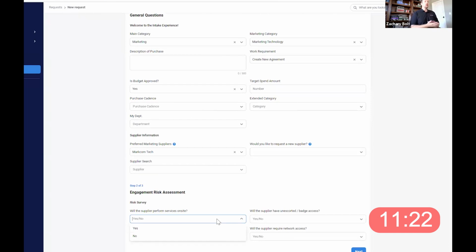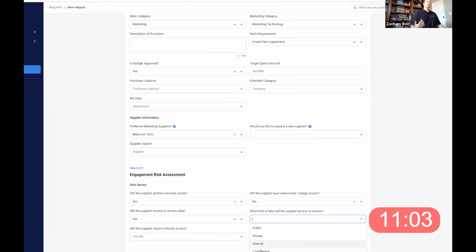All right, so if you need to have like a risk register and do inherent risking on your request, and you want that to bubble up onto the request object and have it visible in the orchestration workflow as you go through, we support that. And these are configurable, so your questions may vary, but the idea here is that you can weight and score these guys. And as you do that, the system's going to auto-calculate what that risk register should be for this engagement.